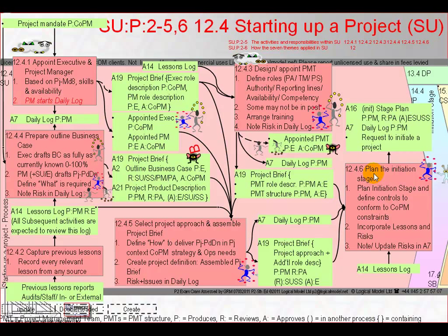Also, a project in a program may have predefined timescales for initiation that the scheduling must accommodate. Whatever the choices, an initiation stage plan plus reporting and control procedure is produced by the project manager, reviewed by project assurance, and very shortly will be approved by the executive, senior user and senior supplier, either directly or through their project assurance delegates.